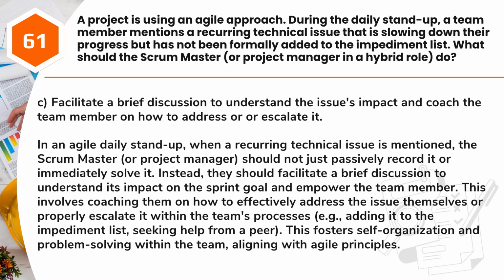Answer: C. Facilitate a brief discussion to understand the issue's impact and coach the team member on how to address or escalate it. In an Agile daily stand-up, when a recurring technical issue is mentioned, the Scrum Master, or project manager, should not just passively record it or immediately solve it. Instead, they should facilitate a brief discussion to understand its impact on the sprint goal and empower the team member.